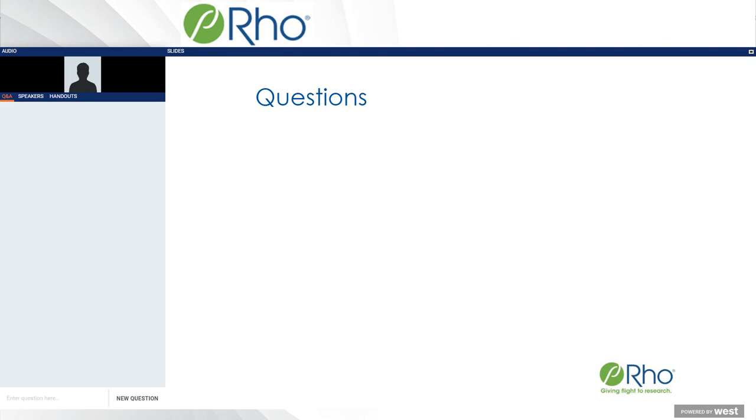It's a great question, and I think this is related to the topic where we talked about having two subjects enroll initially and then maybe take a look. Again, a lot goes into this. So what are your corporate goals, and will this staggered approach fit in with those corporate goals? I can tell you a lot of these experienced sites, they do it already. So talk to them about it. Is this part of their quality management plan? Do they maybe have two surgeries in 1 week and then they review their processes? If that's already part of their processes, then it makes it a little bit easier for you to incorporate that in your processes.